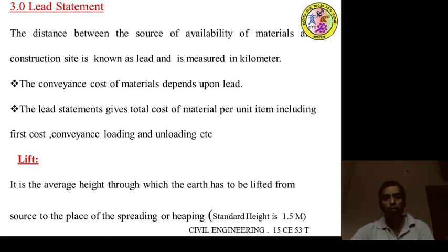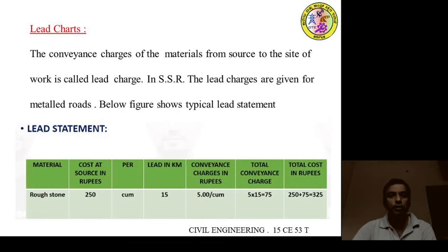Up to 1.5 meter a certain rate is fixed. After 1.5 meter, an additional rate will be fixed according to the depth of excavation. That is called a lift. This is the lead charge. What is lead charge? The conveyance charges of the materials from source to the site of work are called lead charge.